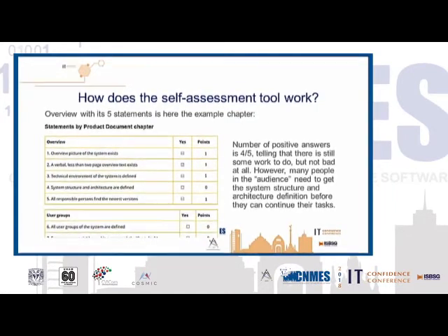And then all responsible persons find the newest version. So this is very important, and at the end of every chapter we have this question. Because I was just reading that 1/3 of all people's work is wasted because they have to search the documents and they don't find them, they have to rewrite some documents because they have lost the newest version and so on. So it's really important always that all responsible persons find the newest versions. There is no question which is the newest, which is the current version. So that's in all of these.